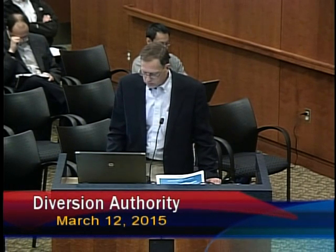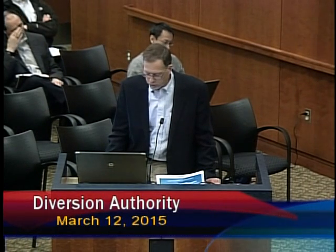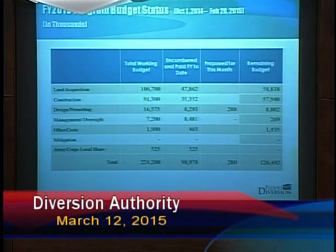Just want to toggle down one slide. I have just a short budget update slide here. Just wanted to summarize the total working budget of $224 million, encumbered and paid to date, we're at $99 million. This proposal for this month totals $280,000 under the design and permitting task. And on that task, there's still about $8 million remaining on that budget, so we're well within that budget for that task.